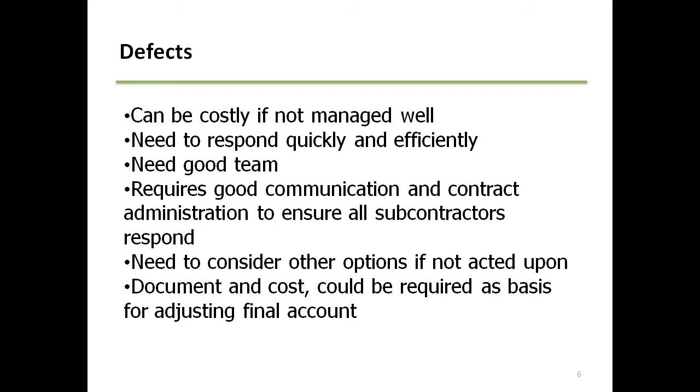Now, defects, as I mentioned earlier, can be really costly if not managed very well. It's important to keep the documentation of them up to date from both sides, both the builder and the client or the client's representative. The documentation quite often is an accurate schedule, as well as maybe photos or drawings marked up showing where the defects are, when they were identified, what needs to be done, and an inspection, and then marking off on the schedule when they have been attended to and completed and both parties are satisfied.